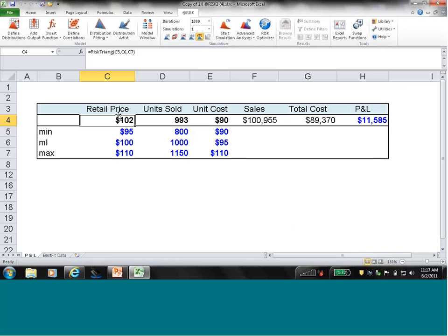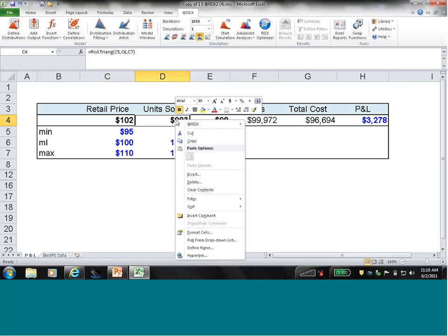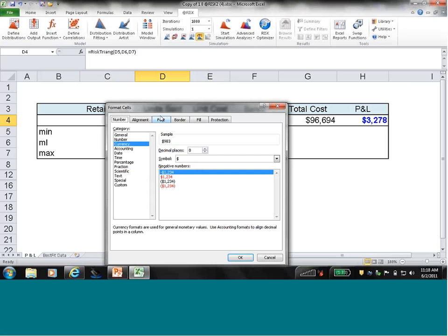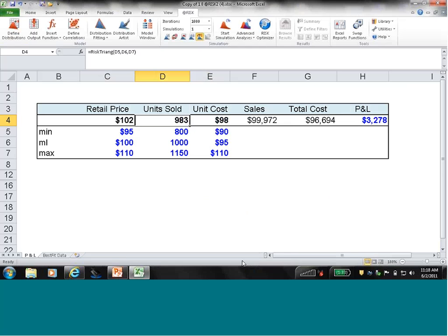So what we've done is we've added our own functions to the Excel functions library, and you'll see that in a couple different ways as I go through this example. Now instead of a single point estimate, we have a triangular distribution as our first input put into cell C4. Since we've used cell referencing, the nice thing we can now do is drag this over. It works just the same way Excel does, with one minor change, we have to format this cell as a number. And so now we have 3 different input distributions instead of these single point estimates. So that's the first part of setting up your model, is defining your inputs.